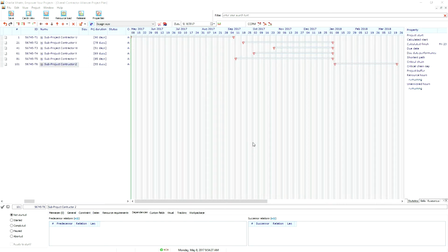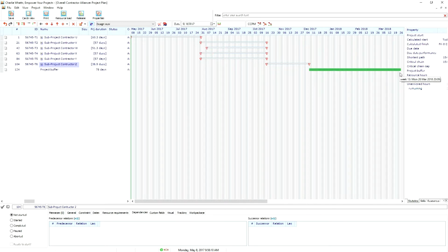Now I'm going to convert the integrated planning into an integrated critical chain planning. Whether your subcontractors admit it or not, their projects contain significant reserves and buffers. People do that automatically without thinking about it. They often don't know themselves. But believe me, projects are full of it. So I take apart 33% of the duration of the task as a reserve and move it to the end of the project as a buffer to absorb the uncertainties.